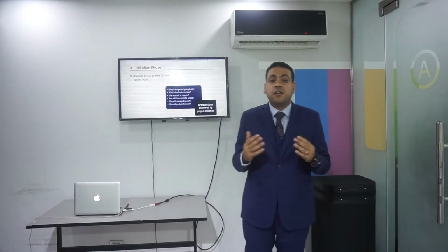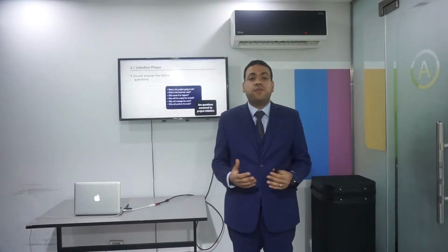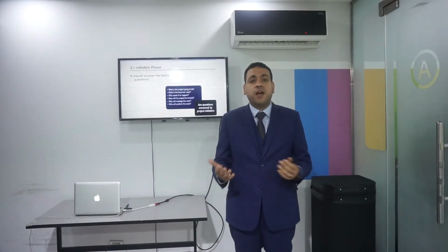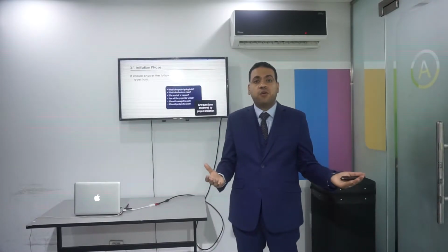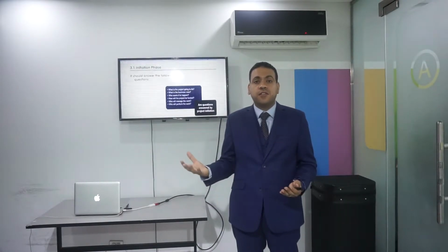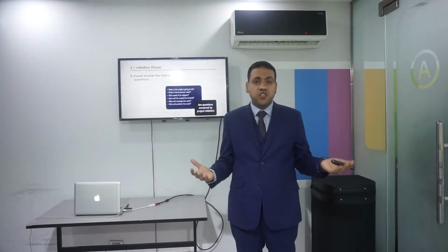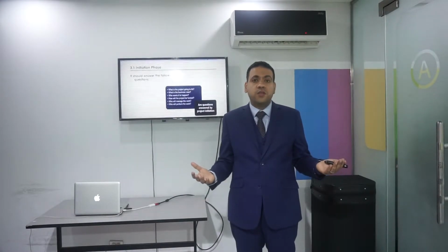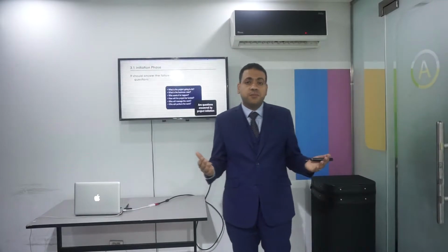Second, your business case. Business case is about the objectives of doing this project. You have 2 types of objectives: strategic objectives and financial objectives. The strategic objectives are like you want to increase the market share by 30% by the end of the year, while financial objectives might be you want to increase the ROI by 20% by the end of the year.